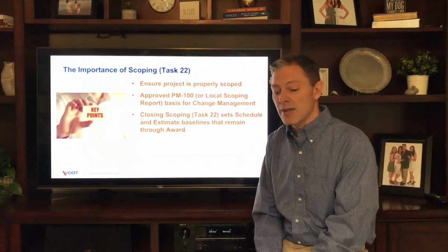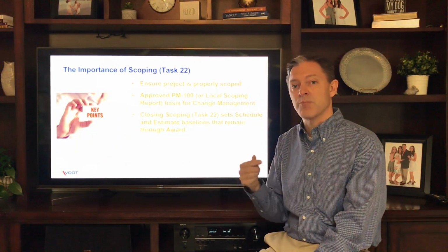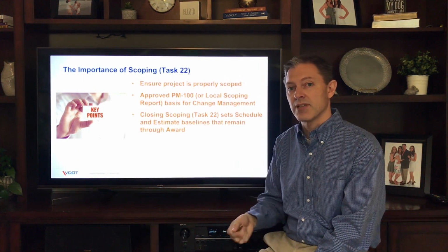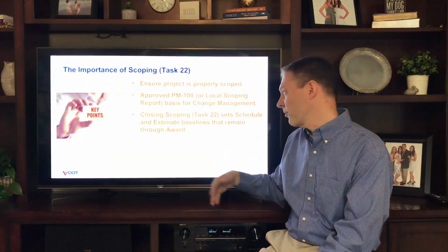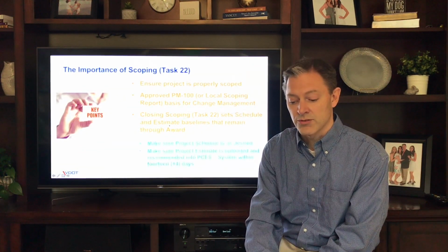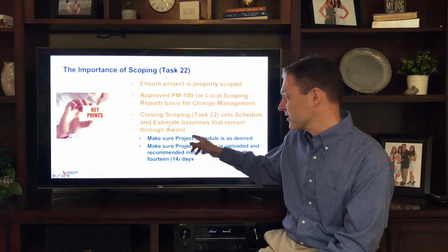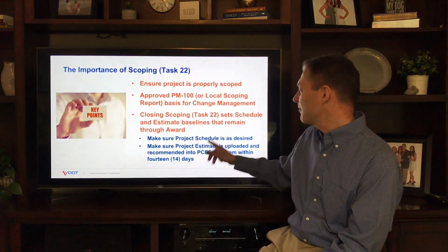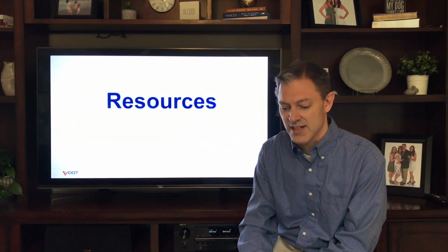And finally, be reminded that closing scoping sets that baseline too, that scoping baseline, which takes you all the way through award. So make sure your schedule and estimates are correct before you close scoping. Make sure your project schedule is as desired, and make sure the project estimates are correct in PCDS.